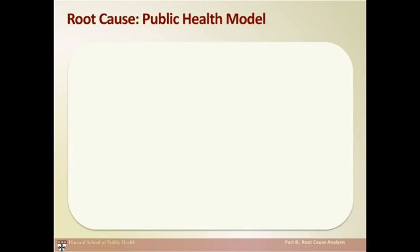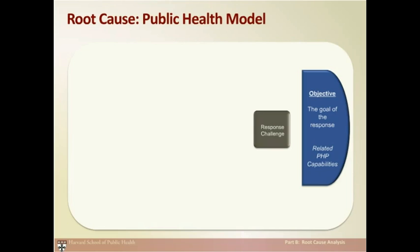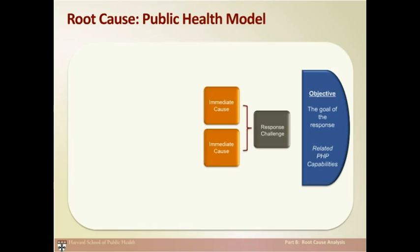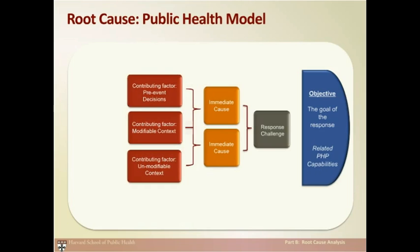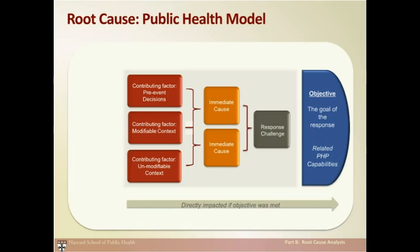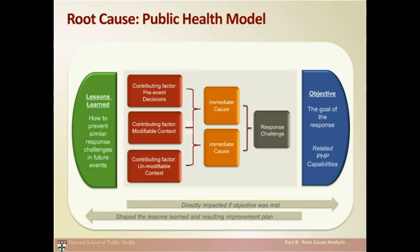Now that we understand the basics of root cause analysis, let's look at using root cause analysis to solve more complex problems. We start with identifying a response challenge — the high-level concept that made this event difficult to respond to. The objective or goal of the response is also considered, as it's important to remember the ultimate mission. A more complex problem may have a number of immediate causes, which are clues to dig deeper to find the contributing factors, or root causes, that directly impacted whether response objectives were met. Identifying what behaviors, actions, or processes need to be changed leads to lessons learned — recommendations for preventing similar response challenges in future events. We also consider any adaptations or solutions and shifts in routine that helped improve the situations surrounding the response challenge.